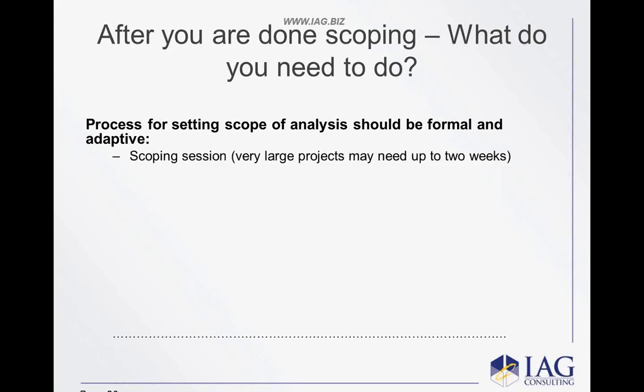When we do small ones, in other words, if one of you today approached me and said, hey, Keith, listen, I want you to help me and engage on a project. It's about $1 million client-side spend. I would just do these questions over the phone. You'd see me asking exactly this set of questions over the phone, and I'd have this thing figured out in terms of how big it was in roughly an hour or so of conversation. It's a little bit bigger, maybe 2 hours if I happen to have a consultant in the area and they're just on site. Maybe they take a couple of hours with you and we actually get to a full requirements definition management plan. But you have to have some forum for being able to deal with the intake and the asking of these questions.